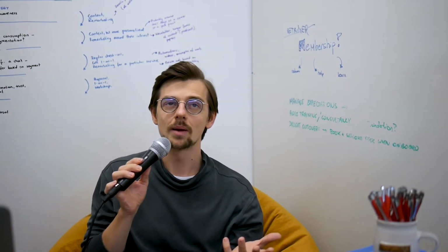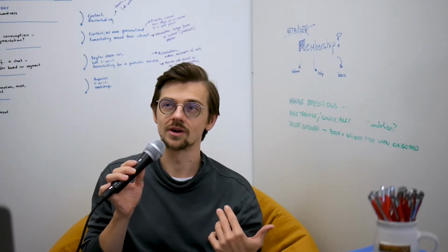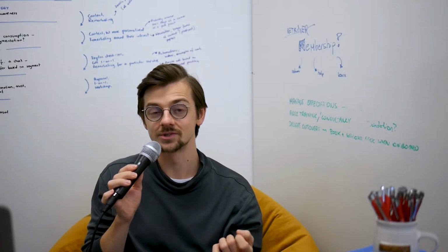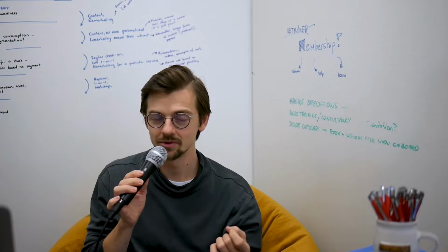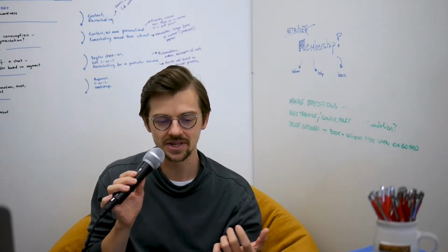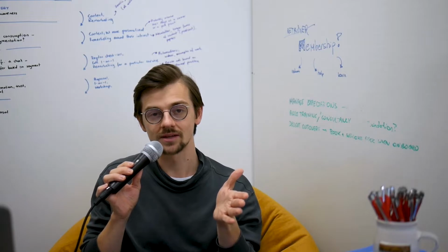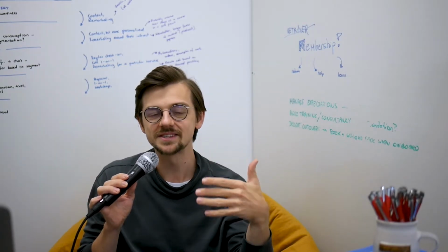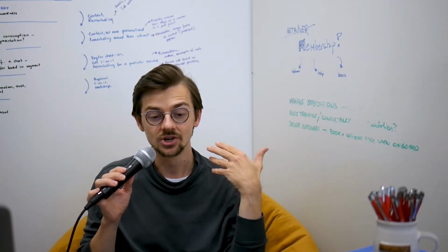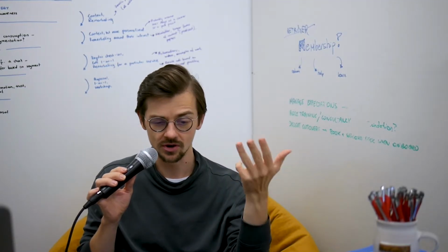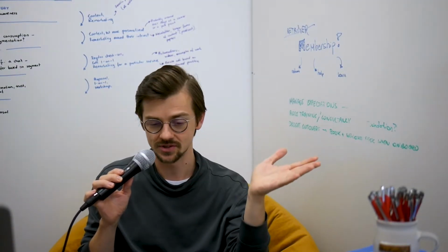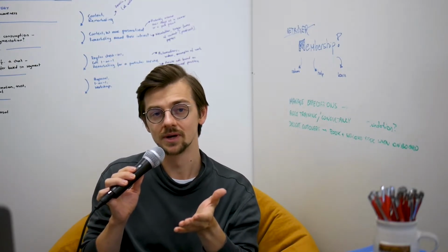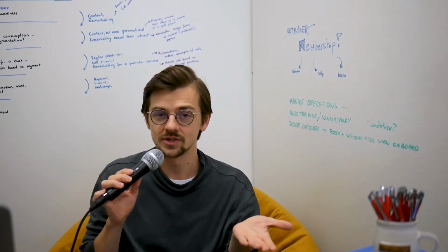So imagine if a website was scheduled for 4 weeks of development. You would only get a maximum of 2 opportunities to talk to your team. And that's a problem. You can't have that kind of a gap, especially if at the beginning of the project the velocity of the team is so high because you keep building those small pieces of interface daily. Like, you can literally churn out buttons, fonts, colors, some basic separators and sections in a day. Really, you can do that. You have to keep talking to those people as frequently as possible to ensure smooth progress.